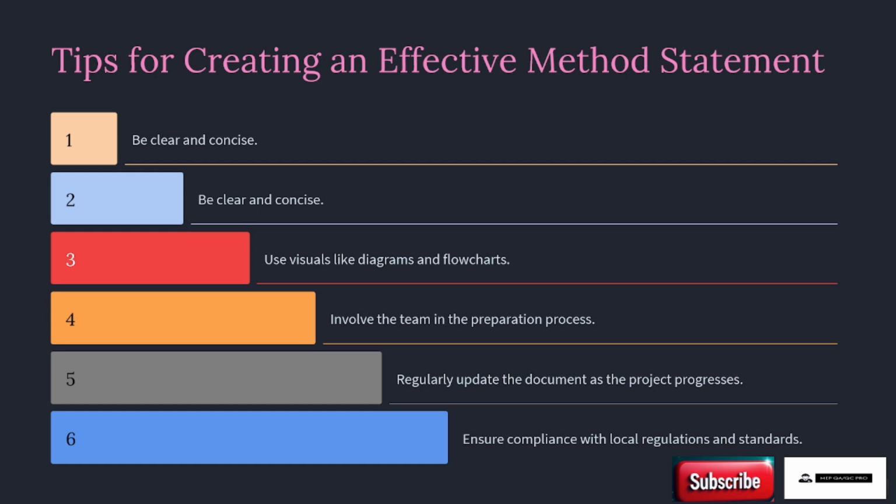First maybe you will do underground work, then the slab work, then first fix, second fix, third fix, everything will come in sequence. So you need to be clear what will be going outside after 3 months or after 6 months, and that this method statement has to be submitted 4 weeks, 5 weeks or 6 weeks prior to starting the work. That needs to be clear and concise.